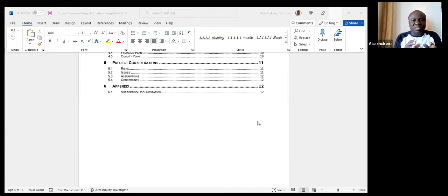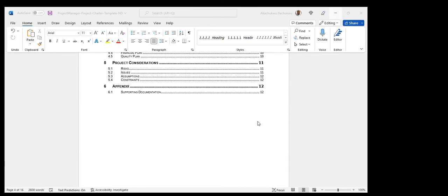Now, if this mini project is totally independent of whatever the business is doing, then yes, it probably will have its own budget, its own different project manager, and its own different team that only reports to or liaises with the project management office at that level. So it depends on how it's structured. If it's structured as part of something global or enterprise-wide, then it probably doesn't need it. But if it has nothing to do with something global or enterprise level, you do need it. So it's how it's structured.